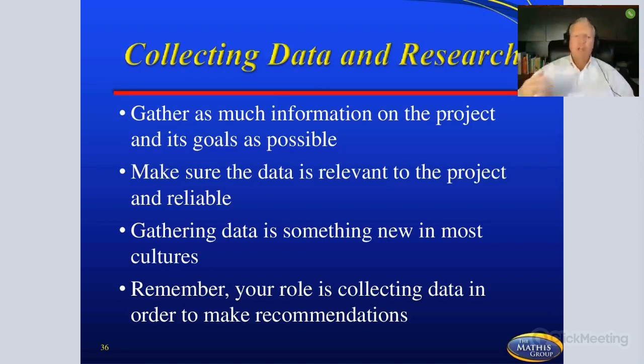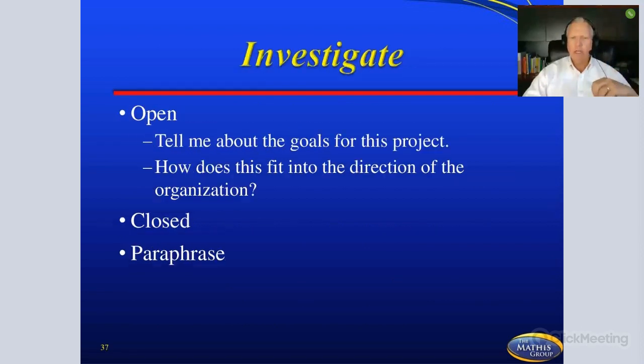Remember, your role is to collect data in order to make recommendations or in order to make decisions on what those requirements are going to be. And so that means that you've got to be that person who's asking the question. You want to ask the hard questions on this side of the meeting, at the very beginning, not in the middle, because the middle is when you've already invested so much time and effort going in a direction that might not be correct.